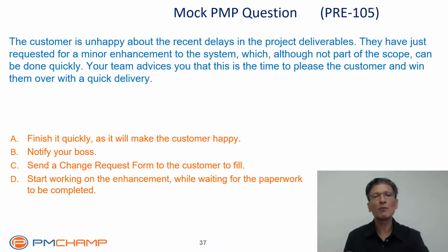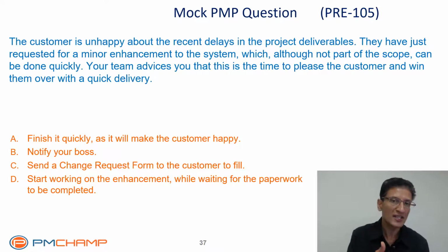So just notifying the boss is not the complete solution. It is just part of the solution. It doesn't look like the best thing to do. Can you start working on it while the paperwork is being completed? No way. Until the change is approved, you can't touch it. And since it is not yet approved, no way we can touch it.